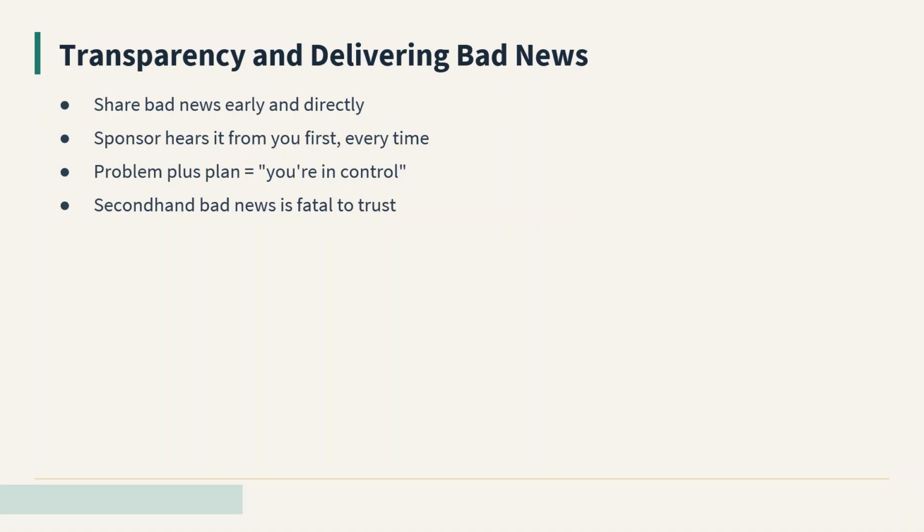The mental rule to follow is that you are the first person your sponsor should learn any bad news from, about any part of your project, every time. If a sponsor ever learns about a problem on your project from someone else first, treat that as a serious failure and repair it in your next conversation.